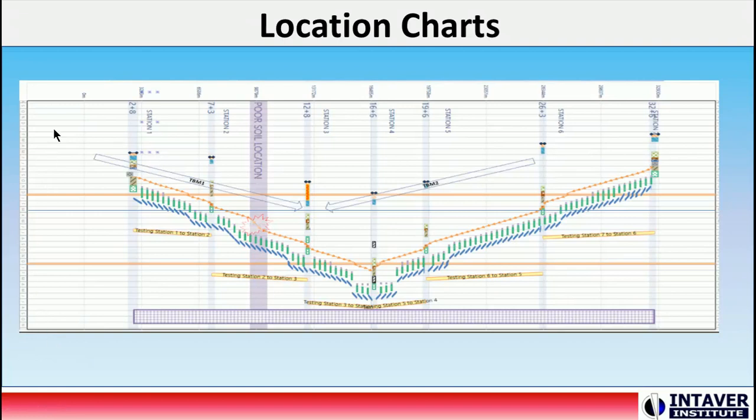Schedule activities are then plotted onto the chart according to the locations over which they occur and the dates that the project schedule determines. Location charts can be presented for both the original schedule and a risk-adjusted schedule. A risk-adjusted linear schedule is the result of a project risk analysis performed in Risky Project. Comparing a risk-adjusted project schedule and the original project schedule helps to determine how risks might impact your project.